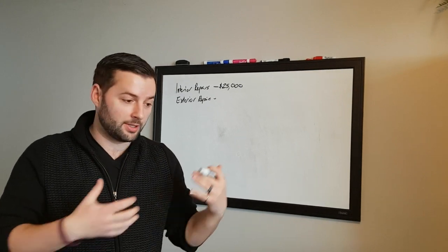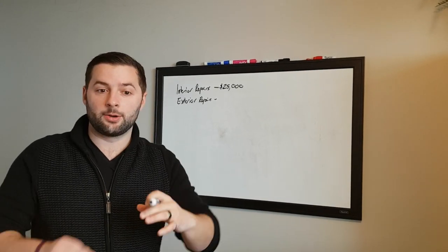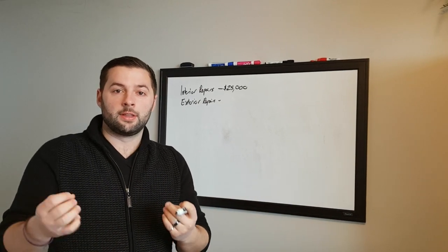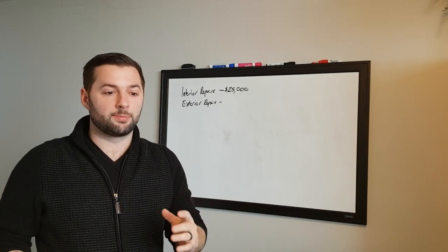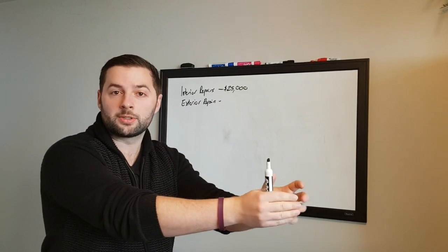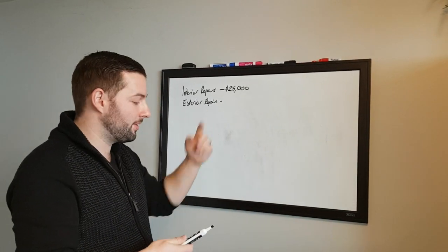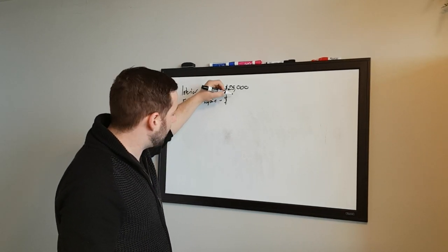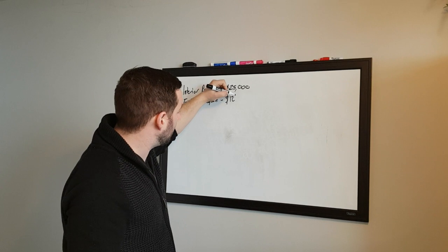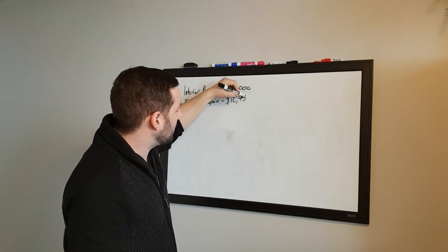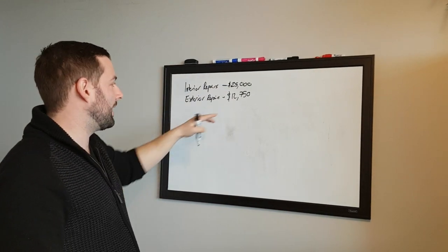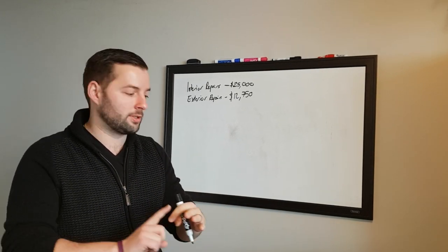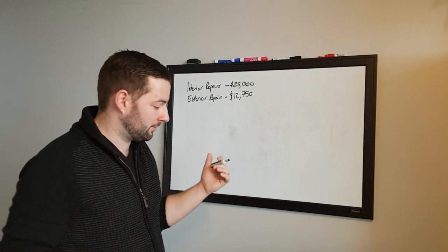But for this particular scenario, we're acting as the overall general contractor, so we're going to be hiring the sub-trades. There are instances where I say, you know what, I'll plunk this project on one person and then they can hire their own sub-trades, but not in this situation. So this breaks it out even further. For a lot of these little tasks, and there was quite a lot to do on the outside, $12,750. That also included some windows, some parging and things like that for the foundation, and exterior paint of the entire house.